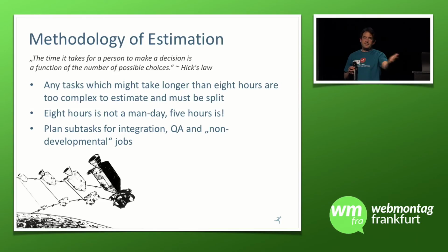Like I just said, any tasks which are longer should be broken down so everybody can understand that. And please don't forget, 8 hours is not a mandate. About 5 or 6 hours is, for 2 reasons. First of all, the telephone rings. Anytime you've taken public transportation, there's always a sign in there somewhere saying, don't talk to the bus driver. You know where I'm going with this. Don't talk to the programmer.